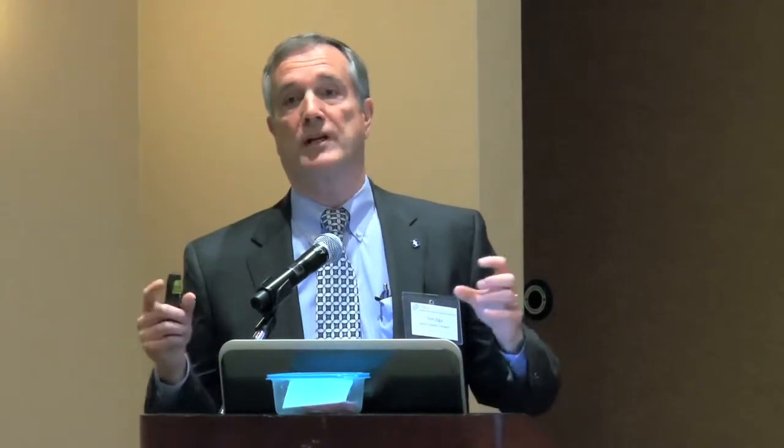We then spent an entire week, started Monday, ended Friday afternoon, negotiating the contract as a team. We probably had 20 people in the room, and we put the contract language up on a screen. We did real live editing as we worked through every line and every principle of the contract, how it was going to come together, and what the responsibilities were. At the end of the day, we had a contract that we could move forward with, and we started bringing on additional members to the team, both on the design side and the construction side. It's important to understand that design and construction were working together right from the beginning.